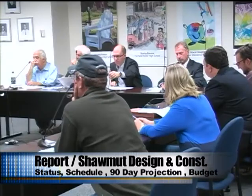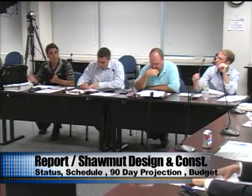So we're going to take pictures of that, send it to the architect. We'll ask Kevin if it's okay to keep the stuff surface mounted, and the stuff that's in the wall that was already broken before we got there would be abandoned. It's already abandoned, but I just want to make sure that that's okay. All right, so we're in a wait and see, and they'll get back to us, and they'll have an idea. Thank you. And everything's going to be pressure tested, and until we get it final pressure tested and let it sit for 24 hours, we really won't know the extent of it.